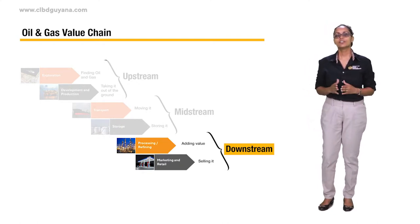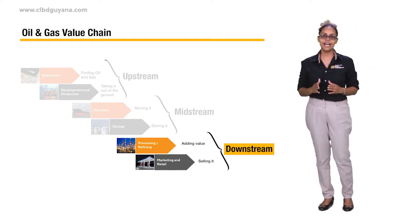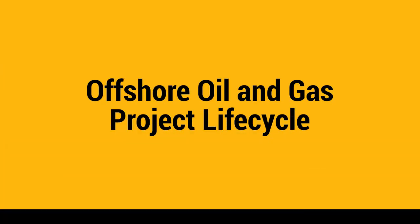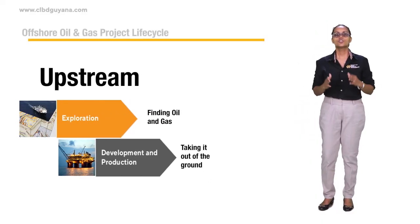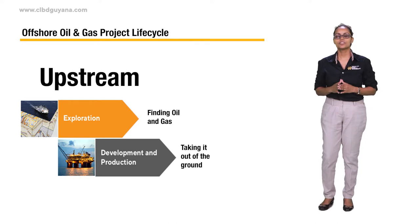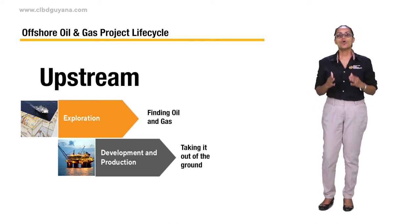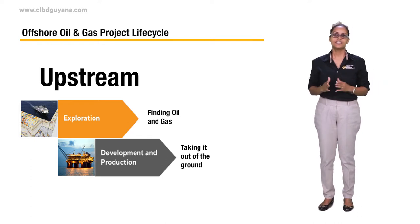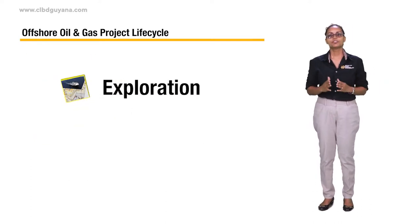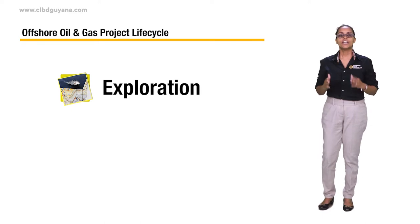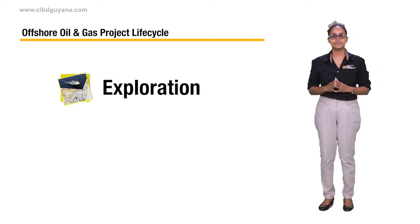Retailers who sell refined oil in Guyana include Shell, Rubis, and Guyol. The focus of this course will be on the upstream segment of the value chain. An upstream offshore project lifecycle involves three main phases. Exploration, which can range anywhere from 5 to 10 years.